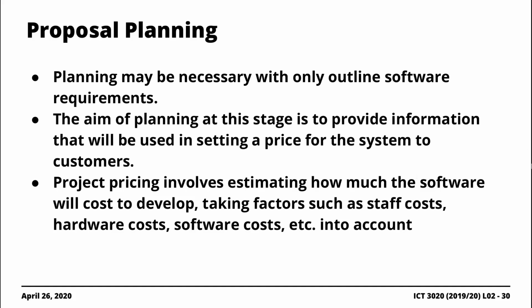All right. The pricing obviously involves, again, part of the proposal. Pricing would typically involve you coming up with an estimate, right? So how many people do you think you would need to develop the piece of software? How many people do you think you'd need to come up with the documentation if you're going to need a different set of individuals? If you need to hire people to do the design of the software, how many people are you going to need? So these would all fall under staff costs.